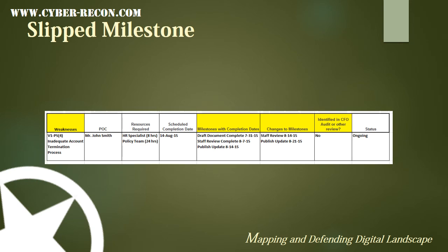It looks like something went wrong and we won't meet our scheduled completion date. It looks like the staff review won't be complete on time, slipping the program to the right. We can't change the scheduled completion date, but we do need to change some of the milestones. So in this case, we would update information in the changes to milestone column, including the staff review date, which is now August 14th, and the new published date, which is August 21st. The status continues to be ongoing.